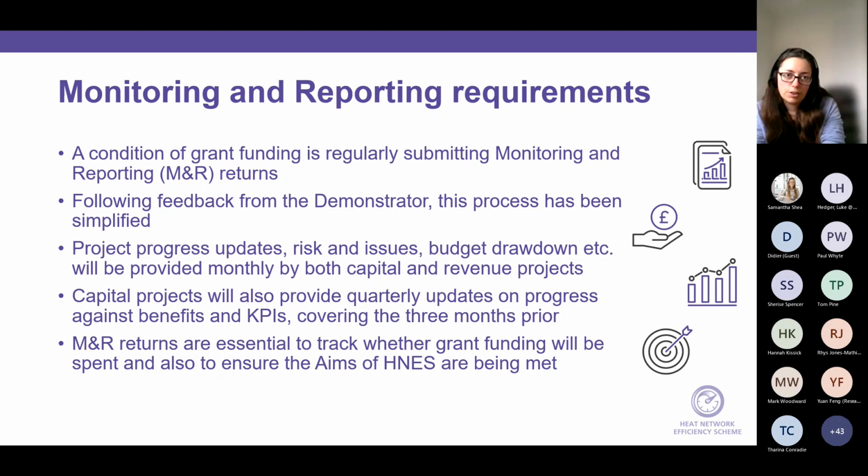For a local authority applicant, they will actually be able to draw down the funds upon signing their memorandum of understanding. So there's a slight difference there between the two different types. But yeah, from a non-local authority perspective, we need to have evidence of spend before any funds will be released.